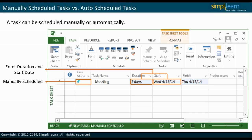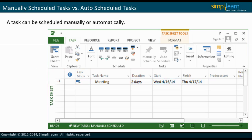Manually scheduled tasks can be used when a task has specific requirements with respect to dates. You can manually schedule tasks in order to accomplish the date-specific requirements and later switch to the auto-schedule.